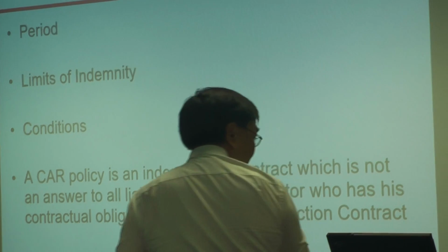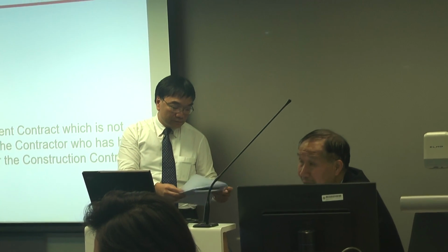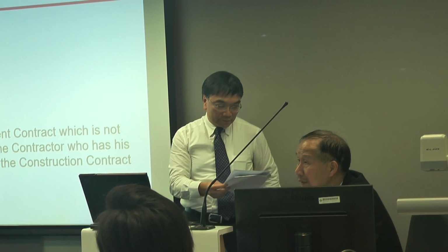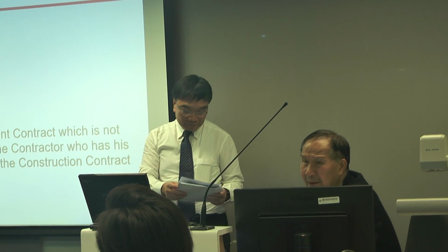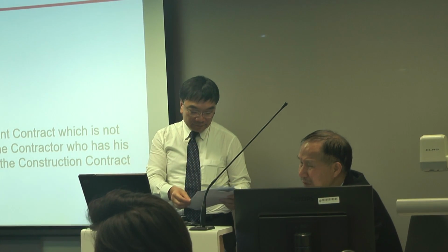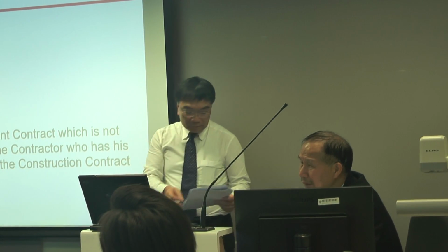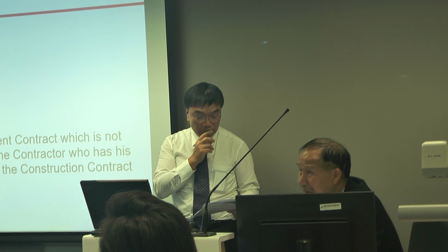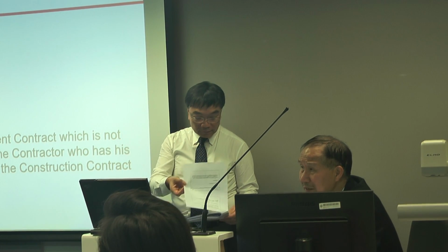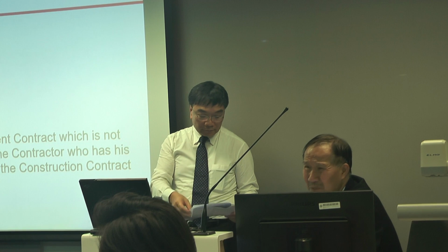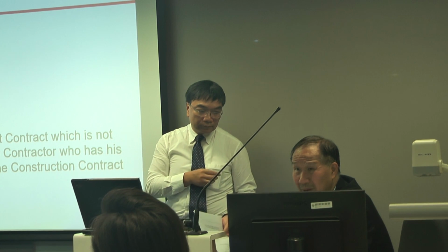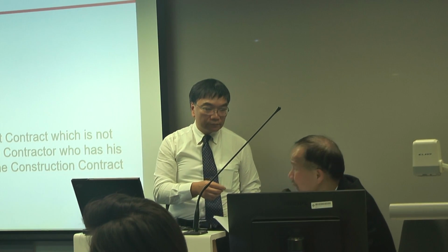The reason why we mention period as a limit is that, more often than not in Hong Kong and in Macau, where I come from, most projects will have a delay. They will be delayed because of political issues, so one of the limitations is the insurance period. You have to be very careful when the project is being extended, like every project in Hong Kong. A policy will not be extended automatically, so there's a limitation. You have to look after that.